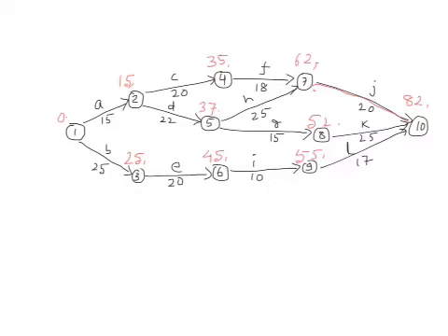Similarly here 62 we have got, this 62 we have got from 37 plus 25, not by 35 plus 18. So H has to be done in timely manner. For F, we may have some extra time in hand, but H we can't delay. So we can say that H also will be on the critical path. So we can similarly connect this here to get the critical path.